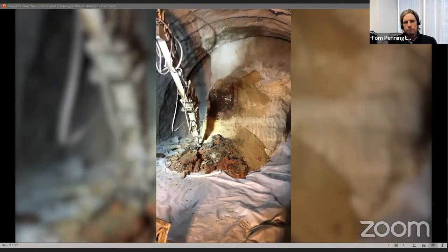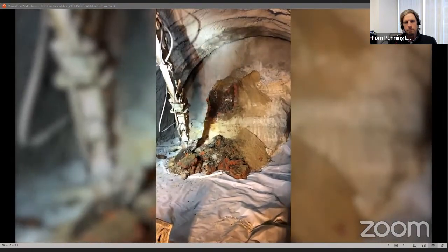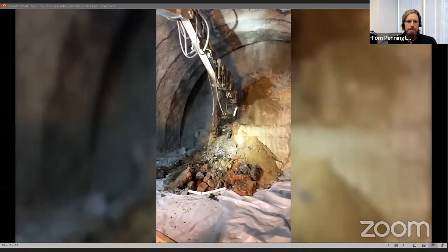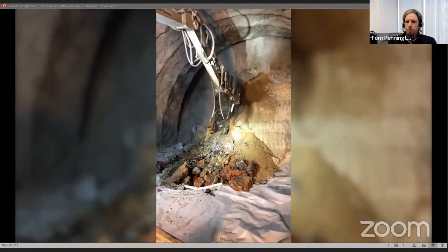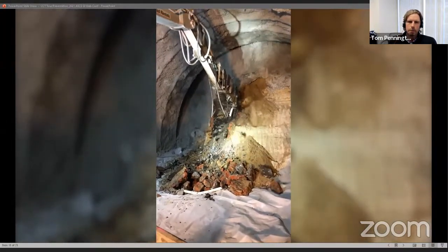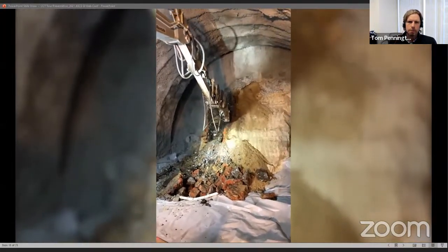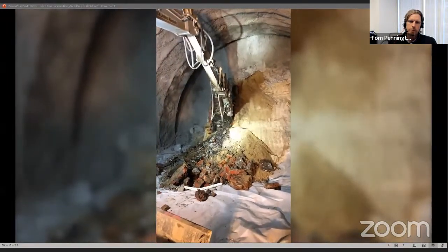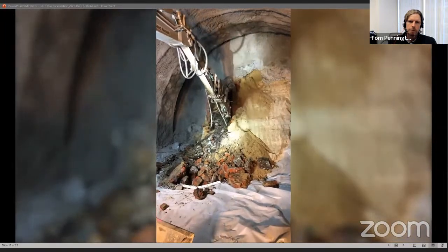When the grout was adequately set, excavation continued, and additional precautions were taken when removing the contaminated ground encapsulated by the brick structure and consolidated with grout. Upon removal, it was confirmed that the brick structure was an abandoned 19th century well backfilled with broken glass and porcelain, metal pieces, and burnt material.